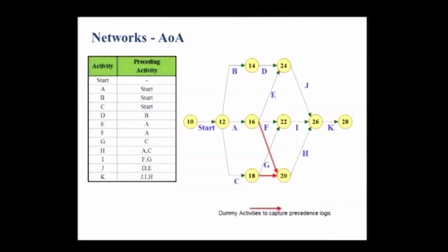So here we have what we call the dummy activity to capture the precedence logic. A lot of the activities in activity on arrow were also dummies, okay. No duration, only a requirement to capture logic.